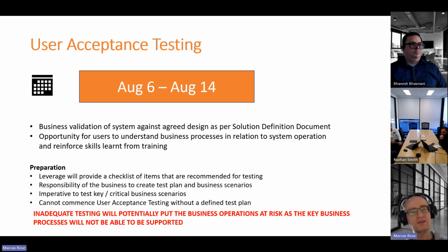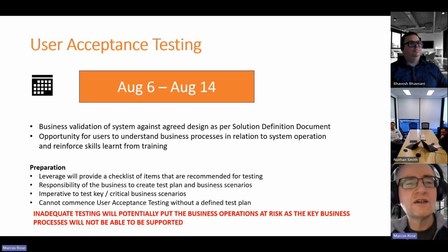What we do need to ensure is that we understand how you're going to test and who's going to test what, and that's what we'll be asking from you at the UAT kickoff. So it's not just a case of, okay, off you go, guys. You need to at least have populated our checklist. Say, okay, Nathan's going to test this. Person Y is going to test these things. Person Z is going to test these things. Just so everyone's aware. Yep. No, that's fine, Marcus. We'll do that. Yep. So fine, we'll look at that with you at the kickoff meeting.